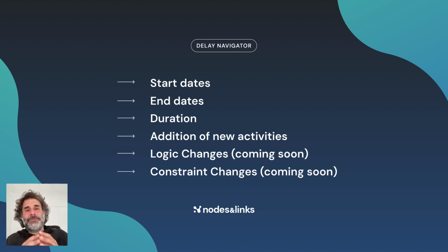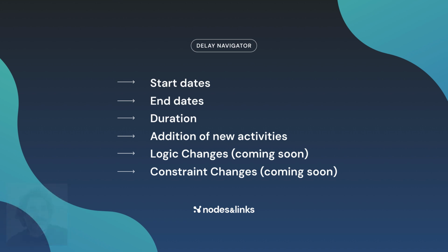In general, if your duration increases, it's your own responsibility. Also, if you start later than you should have started without being pushed by anyone behind you, it's also your responsibility. For everything else, in general, it's your predecessor's fault. Now, there's a little bit more nuance to it than that, but I will talk about it in detail in a different video. For now, let's have a look at how you can see this information on your screen.